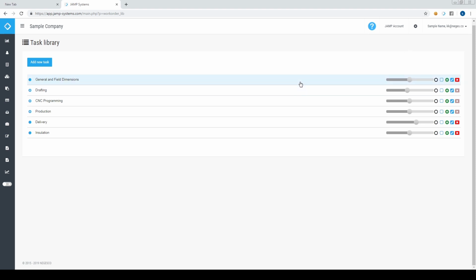We need this because if you have two tasks that you gave to the employee and one takes only 10 minutes and the second one takes like 1 hour, this is not going to be correct in the calculations without the task weights. So you indicate that one of them takes less time and another takes more time. That way, when the first task is completed, you will not get 50%, because that will be, of course, incorrect. It will give you a more accurate percent.